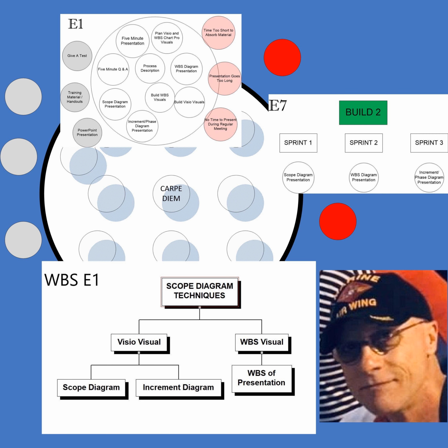So one of the things in this case is that sometimes you have to force the issue. You have to force people to plan, because they all have full-time jobs. They're doing something else. So I actually created a report for each application owner. In that report, they had to name the application and give me an inventory of all the servers, everything that was moving, every piece of equipment that needed to be moved. And when we got that, we went to the current data center and double-checked it. What power did they need? What were the connections they needed? They had to put all that in there.